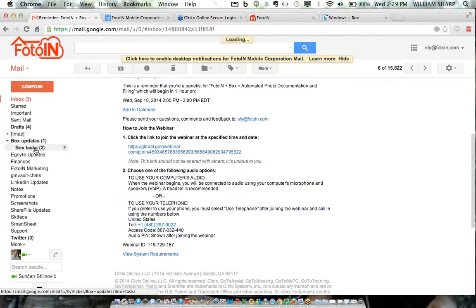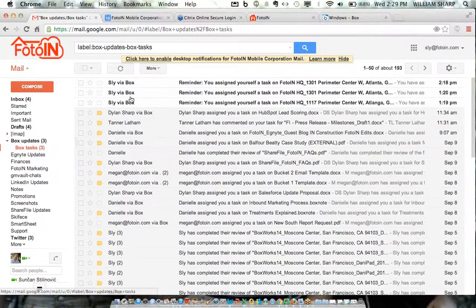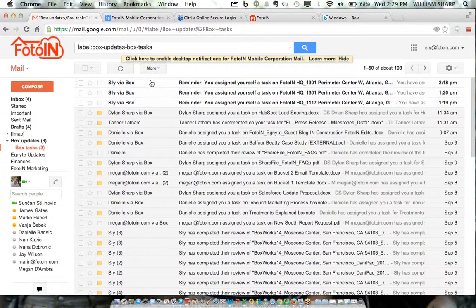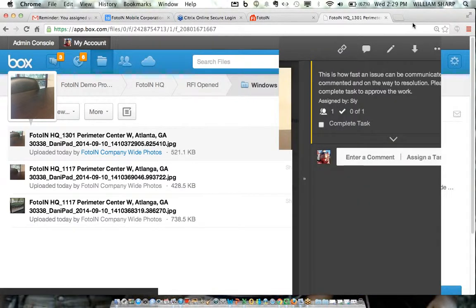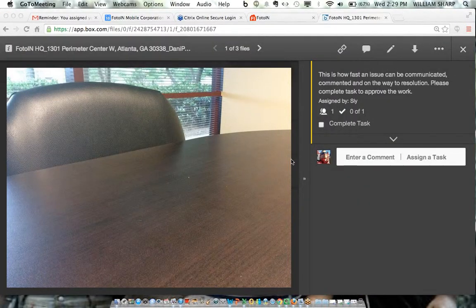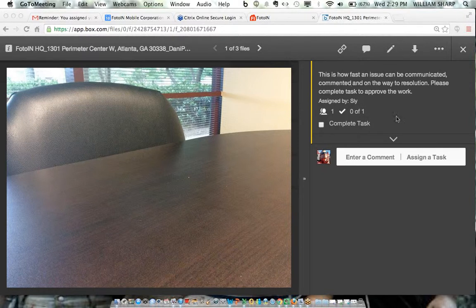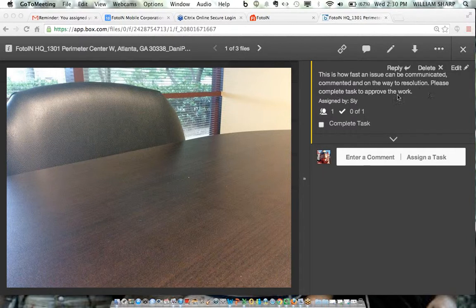In my email, I have a label for Box tasks that I receive. Notice the time — 2:18. There was an automatic task generated for me in Box based on the upload of a specific photo with specific data. I get a reminder, I can click 'complete task' or come directly to this photo. Basically this all happened automatically — because this photo was uploaded as an 'RFI open' issue, Box immediately generated a task for me. And because the task was generated, I got an email reminder. This is a simplified version of how you can set up a workflow — it shows how fast an issue can be communicated and moved toward resolution.